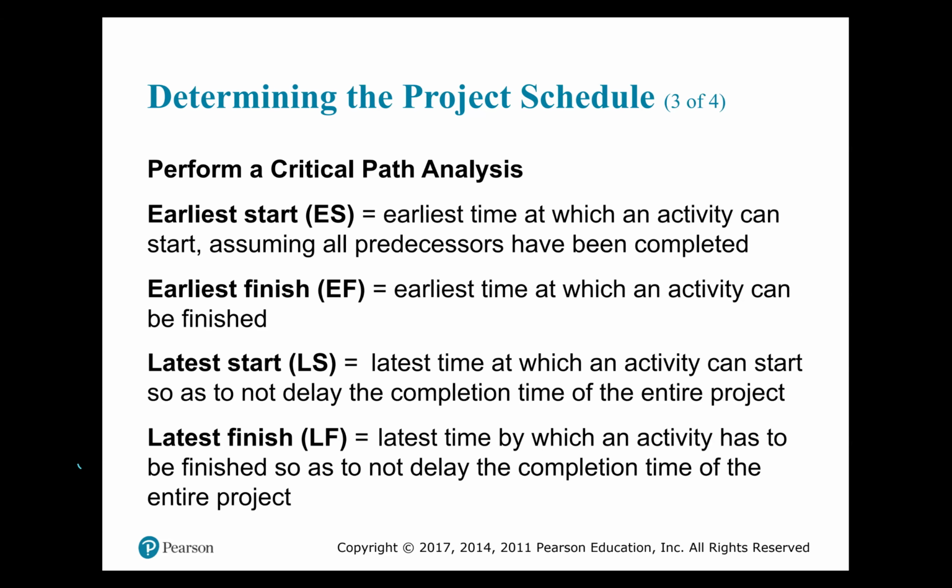The companion to the earliest start time is the earliest finish time. And it is the earliest time at which an activity can be completed. Then you have another set called the latest start time, or late start time, or latest start. Either of those names is good enough. It is the latest time at which an activity can start so as to not delay the completion time of the entire project. And the companion for the late start is the late finish.